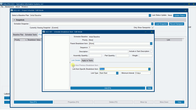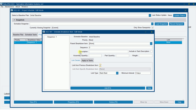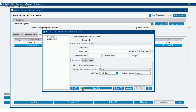We'll fill all that in and apply links in just a minute. Now I'm going to go to new and add another sequence — sequence 2. I'm going to link it to the previous breakdown item, so sequence 1 goes first, then 2, with a finish-start relationship: 1 has to finish before 2 will start. Just like on the scheduled tasks, I could add an interval here if I wanted to. Let's add a couple more sequences — sequence 3 and beyond.